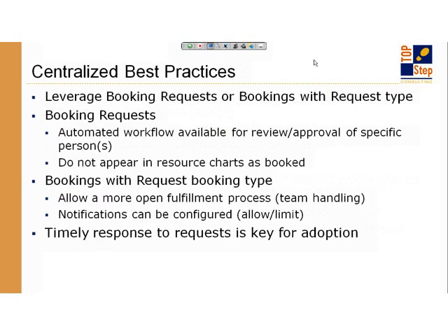So if we go from a centralized best practices, here's things to consider in the centralized best practices. Because you have a person who is responsible for maintaining or managing availability of people and billability, or perhaps booking or scheduling availability of people, what you're going to end up having to put in place is some process flow that deals with a request fulfillment model.